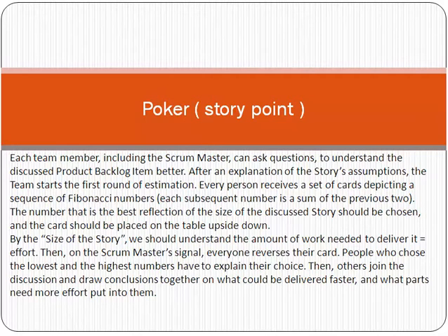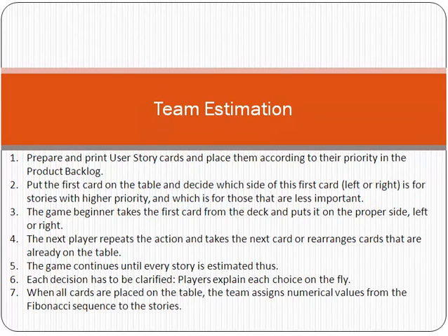Another requirement is that after login, the customer can browse the products in the e-commerce solution and can do the payment through credit card. So we can give this story 8 points. Why? Because it is more difficult compared to story 1. In that way, the scrum team assigns story points to each story and continues like that. So this is called the concept of story points or planning poker.